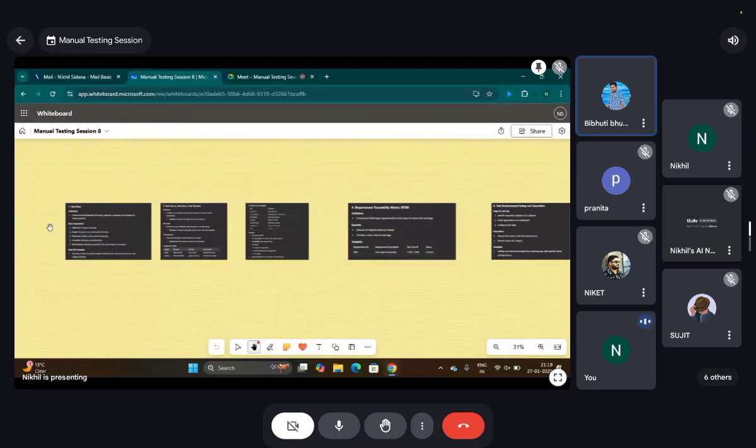A test plan is a document that contains the objective of the testing, the scope of the testing, which means what to test and what not to test, resources for the testing, risk and mitigation strategy, schedule and milestones. That's so simple, right? You just need to speak those 5 words, which are the components of a test plan. Okay, try it once again.